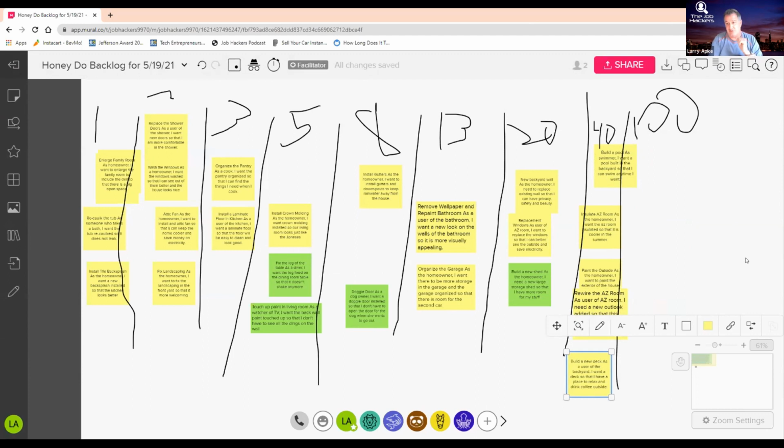These become the yardsticks by which we are going to measure the future work, because if somebody was trying to put something new in, all I have to ask is, I don't ask what's the number, I ask what's the group. So let's say I want to wash the car. Pretty simple. Which group of things does it look most like? Well, it looks like the things in the one group. Okay, that's a one. You see how easy it is?